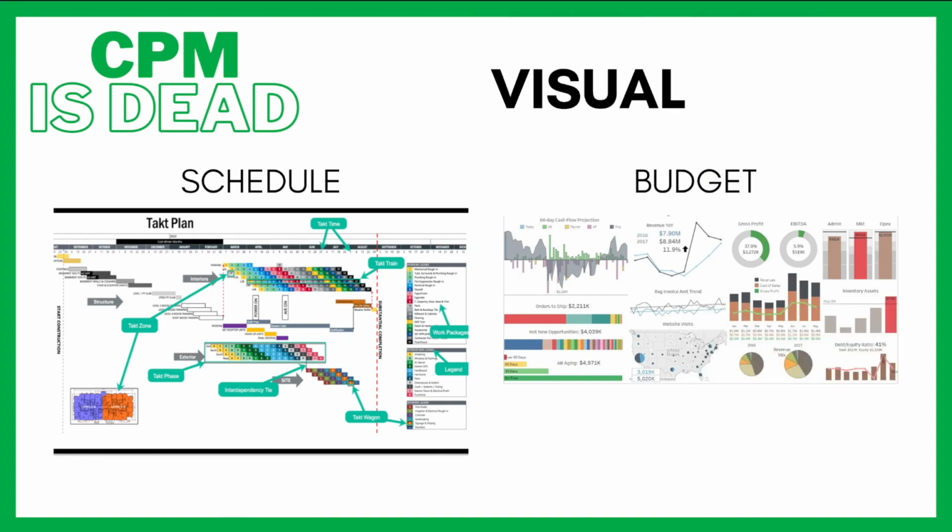Here on the left, we see a visual schedule. It's the same exact information as the 400, 200 page CPM schedule. It's just summarized because it's a three-dimensional schedule that's visual. We see time across the top. Each one of these rows represents an area. So you see interiors has all these different areas, which correlate with a map. And we might have these maps to show us. So we have multiple visuals that give us an insight into our schedule.